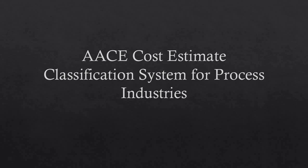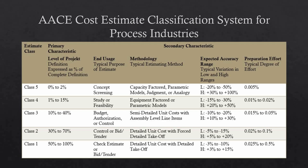AACE, or the Association for the Advancement of Cost Engineering, provides a cost estimate classification system to standardize and improve cost estimation practices. AACE classifies cost estimates into five maturity levels from Class 5 to Class 1. End usage, methodology, expected accuracy range, and preparation effort are secondary characteristics that are generally correlated with the level of project definition. As the class number decreases, project definition increases and estimates become more refined.